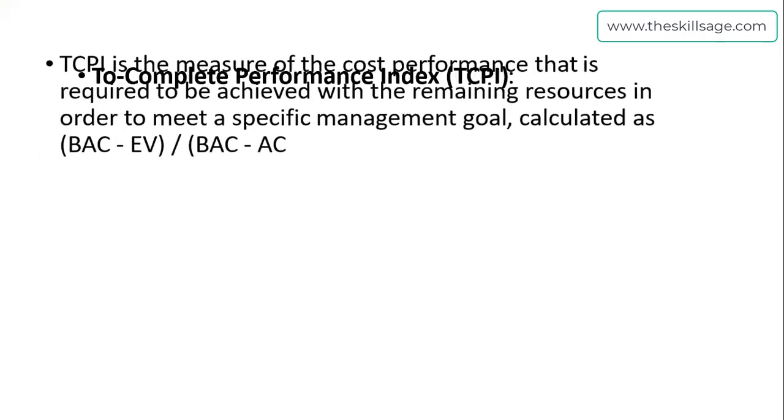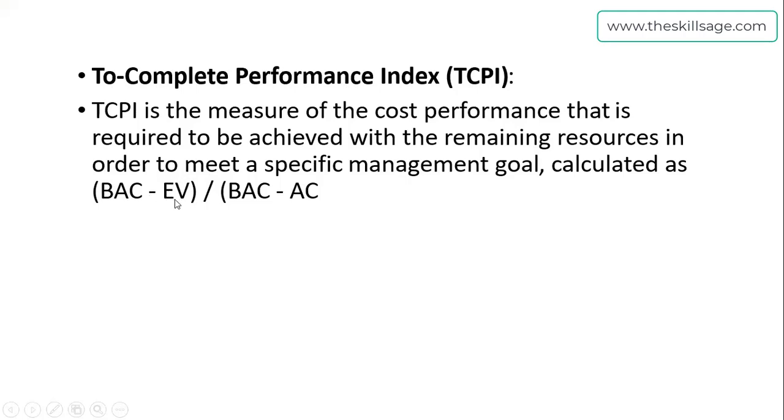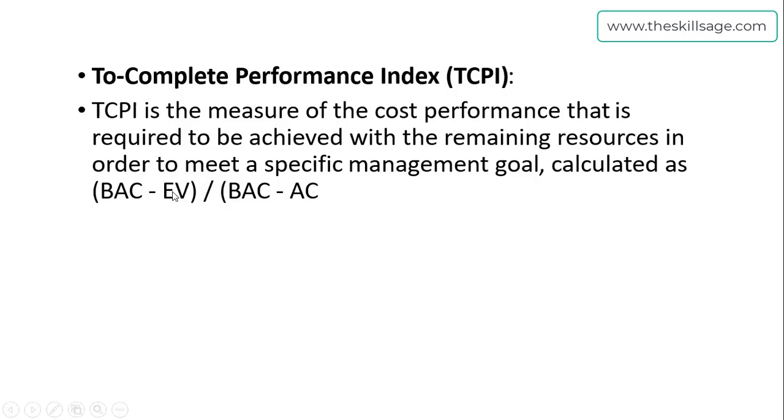Another thing is TCPI—To Complete Performance Index. It's the measure of cost performance required to be achieved with remaining resources to meet a specific management goal. It's calculated as budget at completion minus earned value, divided by budget at completion minus actual cost. Work done as per schedule and work done actual cost will both be subtracted from planned cost of your project, then divided. The factor will give you TCPI, which is also a visualization for your KPIs.